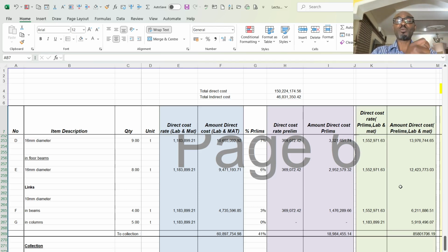As we all know, there are different forms of contract out there, and the choice of any of those forms of contract will depend on the availability of information at the pre-contract stage. You cannot, in all honesty, go for a lump sum contract when the information you have are sketchy. If you go into such arrangement, the contractor is in for a shocker.